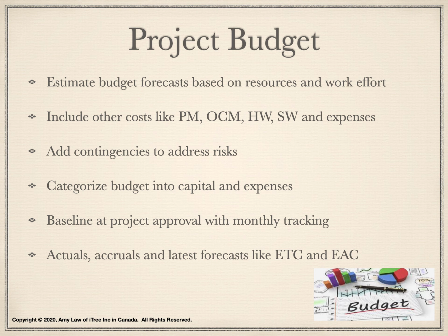The project budget should be created with a baseline at the time when the project is approved. It should be closely monitored to record the actuals, accruals, and latest forecast on a monthly basis. This enables the sponsors and key stakeholders to understand the money spent, estimate to complete, and estimate at completion throughout the project.